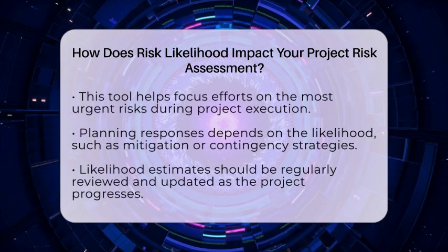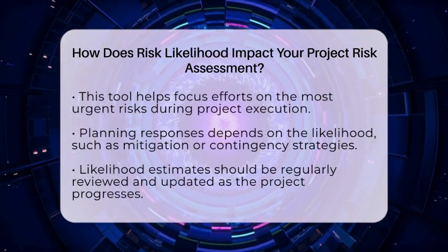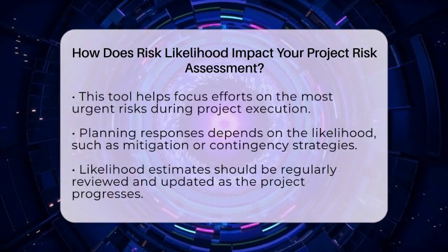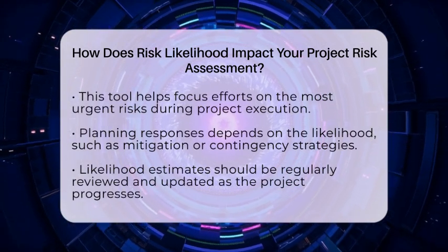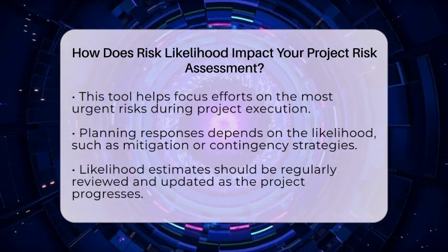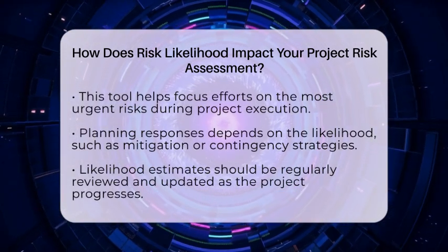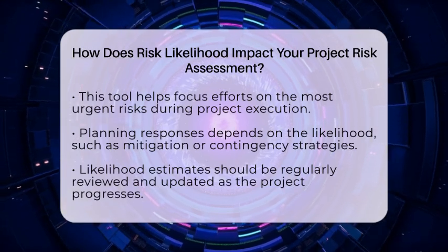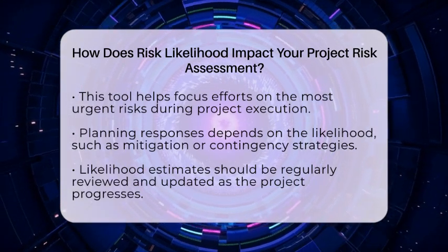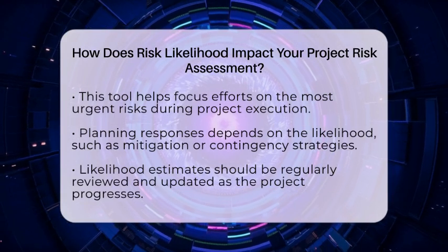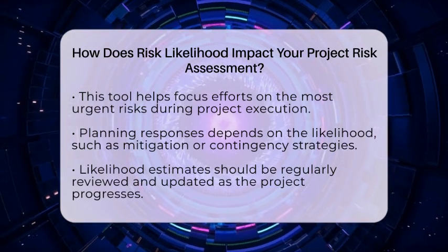Knowing the likelihood also helps you plan your responses. For risks that are very likely, you might develop strategies to avoid or lessen their impact. For risks that are less likely but could still cause big problems, you might prepare contingency plans or transfer the risk to someone else. It's important to remember that risk likelihood isn't set in stone.